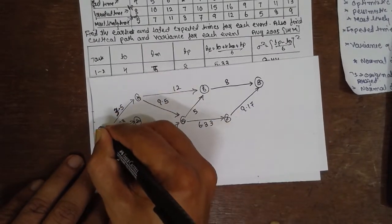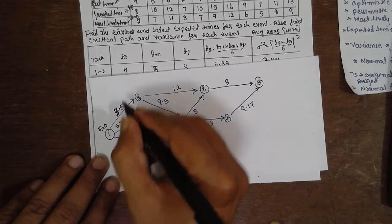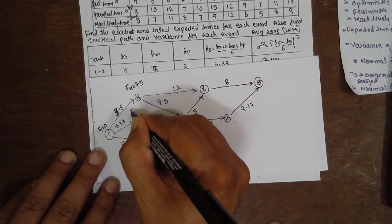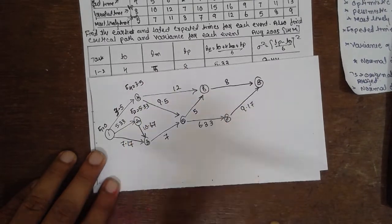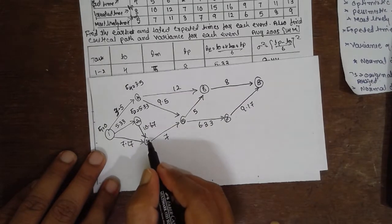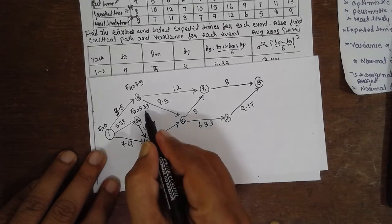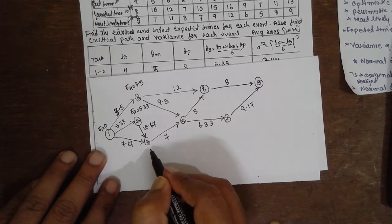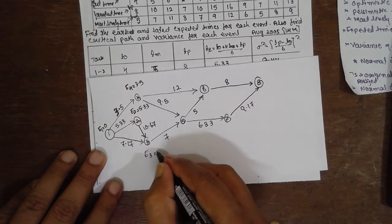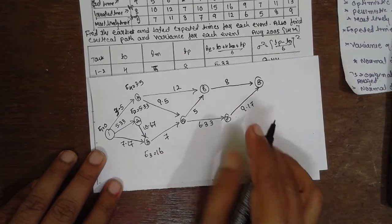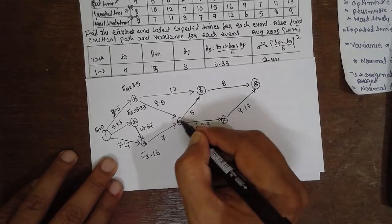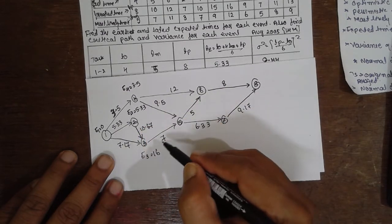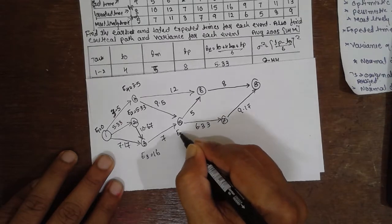Now compute the earliest event times (forward pass). E1 = 0. E4 = 0 + 3.5 = 3.5. E2 = 0 + 5.33 = 5.33. For E3, select the larger value: 0 + 7.17 or 5.33 + 10.67 — the larger is 16, so E3 = 16. For E5, junction: 3.5 + 9.5 = 13 or 16 + 7 = 23 — select larger, so E5 = 23.